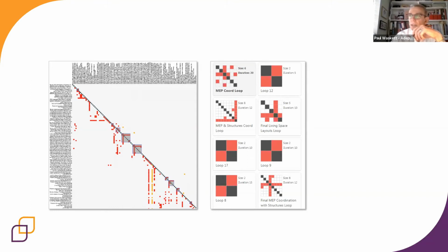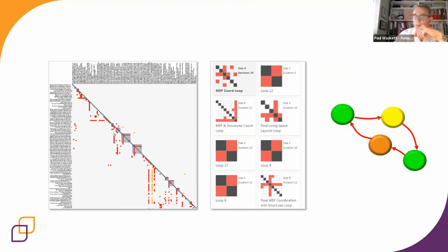And we sequence this matrix to maximize the availability of information and to minimize the number of assumptions that the team have to make as the result of missing information. And down that diagonal line that you see running across the screen, we have clusters of activities that are not just dependent, but interdependent. And that is where the iteration would traditionally exist within the design and engineering process. And there you go, that's the kind of cluster of activities that's represented as we saw on that earlier diagram.